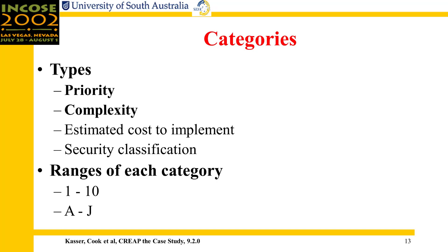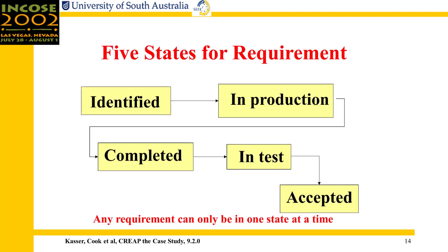For example, if it's a complex requirement with a low priority, do you really need it? Or if it has a high estimated cost to implement and a low priority, again, do you really need it? In each category, you can set up a scale of 1 to 10. Once the rules for setting up a range have been set, they do not change for the duration of the project. But requirements can move within those ranges as you discover more about them as the project goes through its lifecycle. Each requirement may exist in one of five states during the production process.